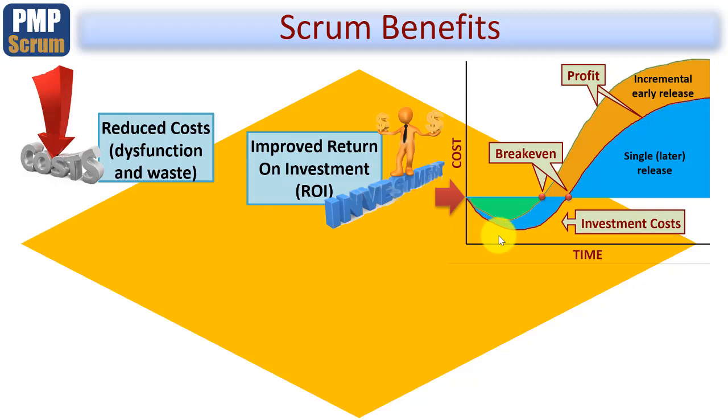And this little diagram plays that out quite nicely. Let me just walk your eyes through it. Let's start off with a traditional project, shown here in blue. The project starts and the project budget is agreed. As a predictive project proceeds, it will continue gradually spending money, quite rightly, until at the end of the project, that's the trough at this point here, that time frame there, you actually ship the end product. And assuming this project will earn some form of revenue, and that's the benefits, then as that gradually happens, you repay back the investment in the project in the first place. Now this might be quite quickly, it might be quite slowly, whatever.